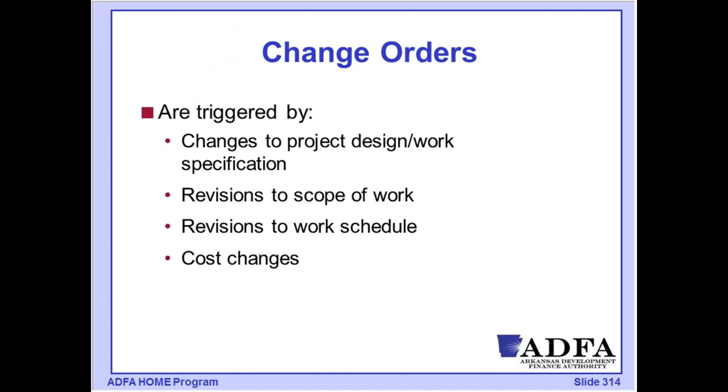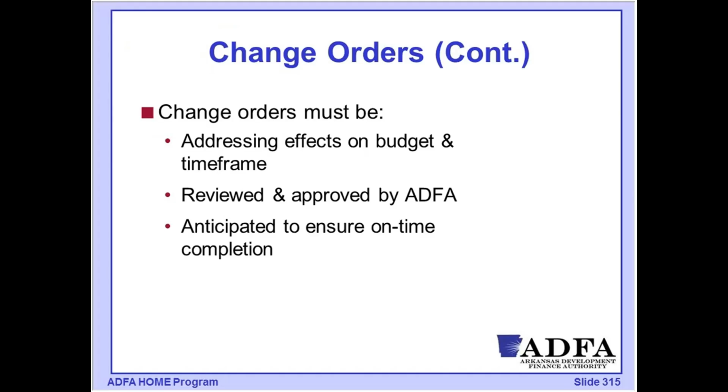Maybe we're changing that work schedule. Anything that is going to have a change on our project, including and specifically cost changes, needs to be reflected and approved in the form of a change order. So change orders must address when there's any change to budget or the time frame for those projects.